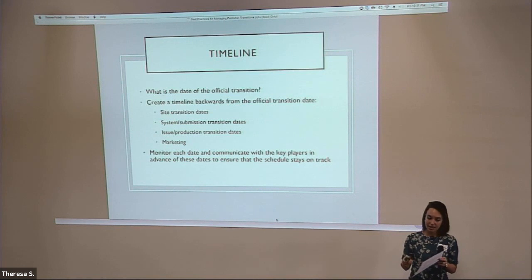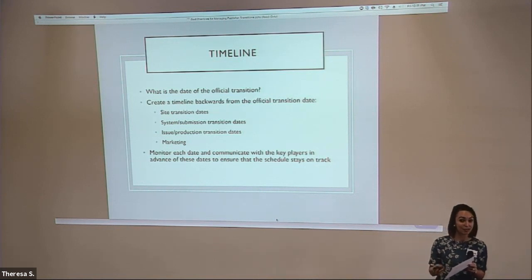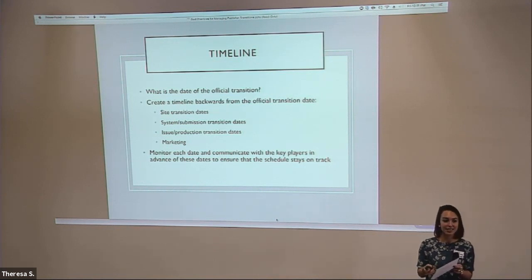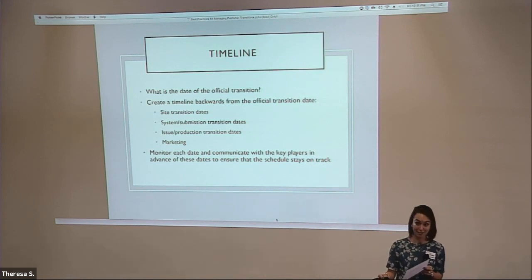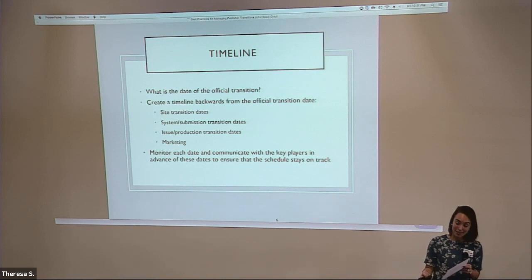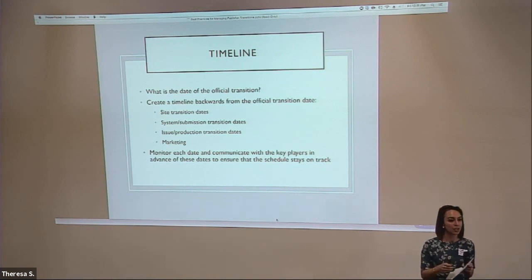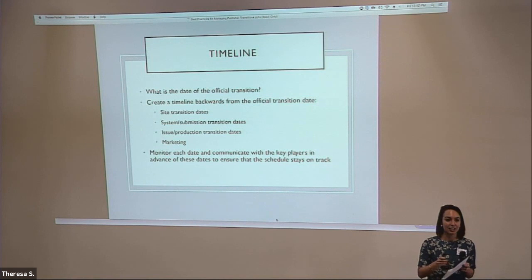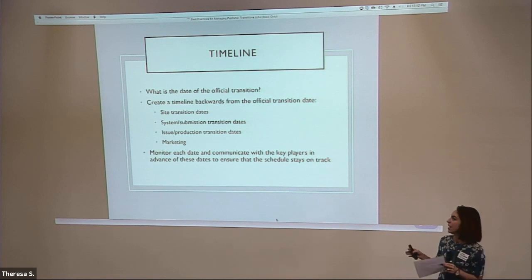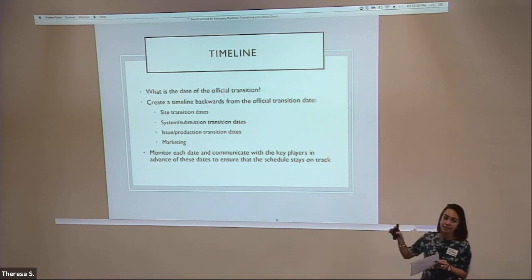Because that is often January 1st with annual contracts, keep in mind you're probably not working on January 1st. Maybe the publisher or your editors aren't either. So make sure that when you set a transition date, if that's a holiday, if that's July 1st and that's a Saturday, that's something you're going to want to think around.